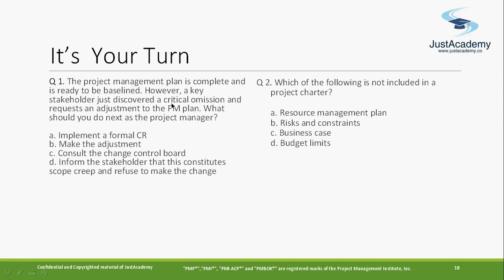You were saying that a critical omission was discovered, so there are some important things that need to be taken care of. So you are directly informing them that we will not take these changes. But here he is talking about an important thing that needs to be considered and it has not been finalized. So you have to make the adjustment, whether to time, schedule, or cost, increase or decrease, whatever. You have to do the adjustment at that moment because you have not finalized right now.